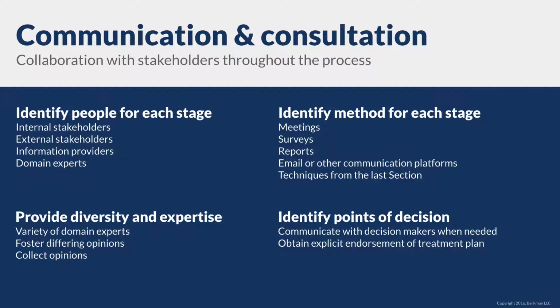There's a subtle art to obtaining the right kind of information for risk management input. The facilitator needs to gather a team with a variety of expertise and foster differing opinions. It is important to gather those opinions on each part of the risk assessment and have the team resolve them. The risk management plan, developed as part of the risk management framework, identifies specific decision points in the risk management process. The team should know which juncture requires a decision, who has the decision-making authority, and what information that person or level needs to make the best possible decision. A risk assessment process must drive toward that juncture.